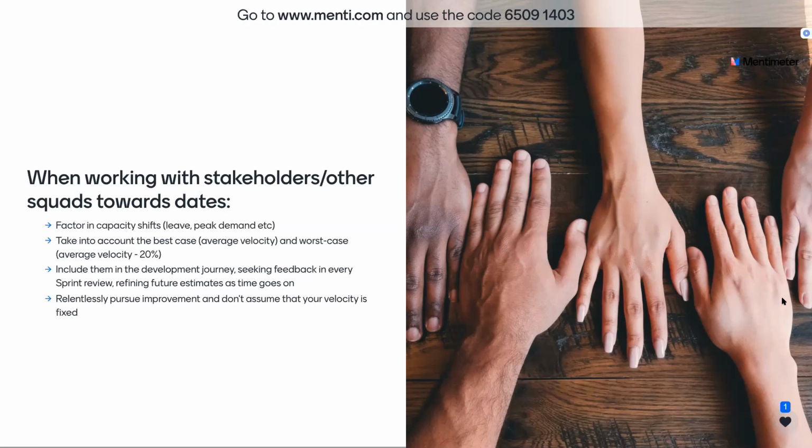Now, whether it's Zoran, it's Neville, it's Stephen, it's whoever it is outside of our walls, include them in the journey through the sprint reviews to showcase what it is that we've accomplished. If we can rely on our definition of done, we say that yes, these two things, they were done. Here's how it roughly works, and here's how we meet those conditions. It really does mean that we can show off that value, and people become more focused on the developing product or service than the time estimate. And they might be more likely to de-scope stuff because they can see working product or service, and they can make better decisions around what is truly needed and what is not.